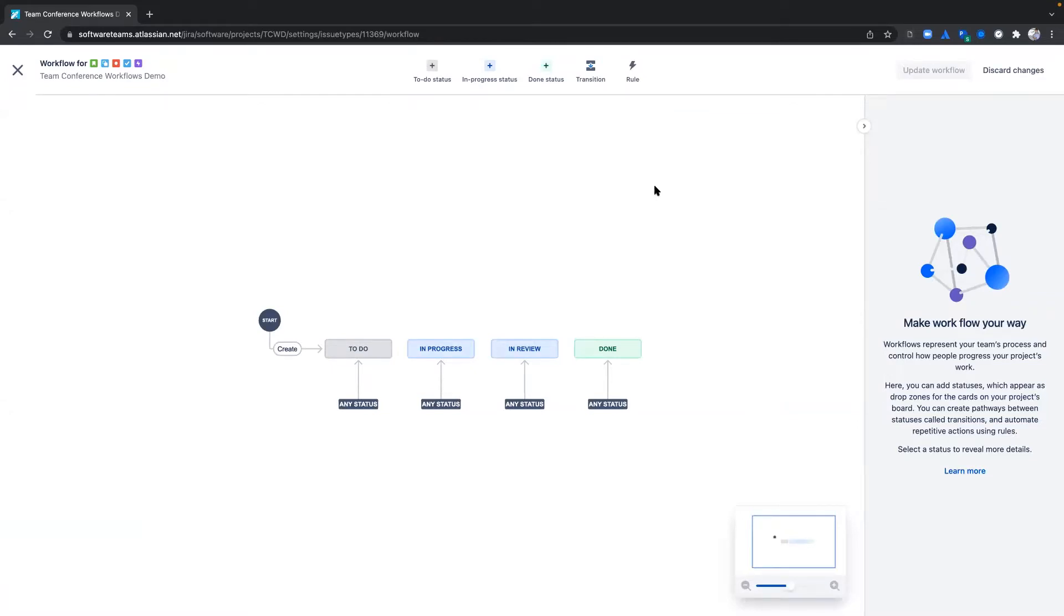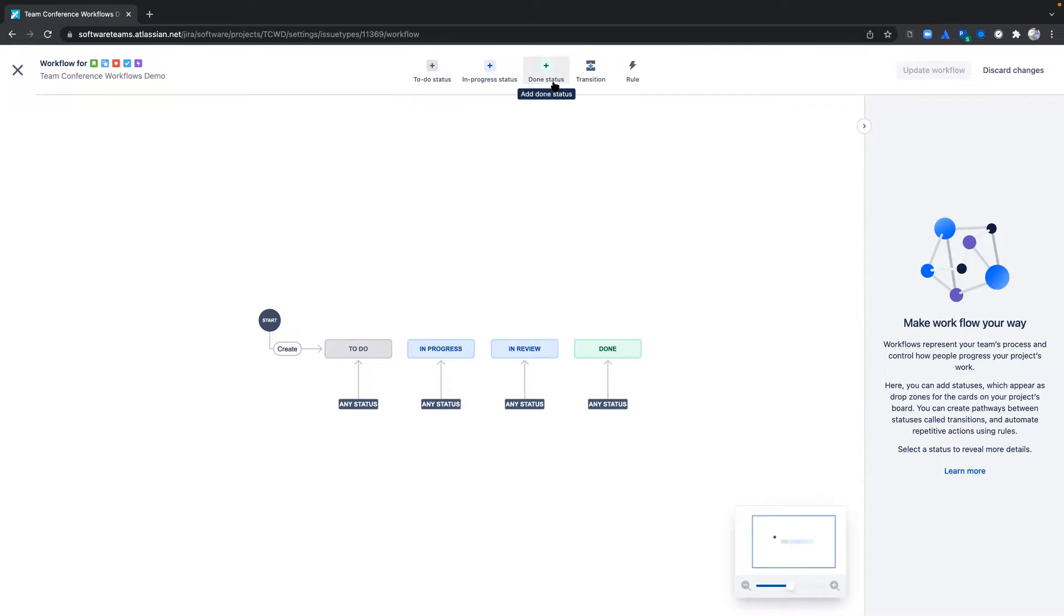Statuses can fall into three different categories: To Do for work not yet started, In Progress for work in flight, and Done for work that has been completed.